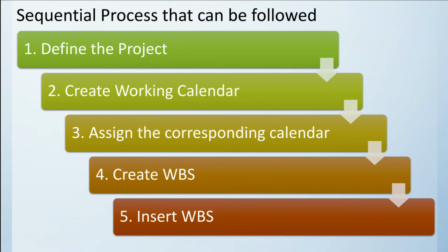Then, depending upon the organization and geographical region, the working calendar changes. Working calendar means the number of days and the number of hours a person needs to work in the organization. So it differs from company to company, firm to firm. So when you want to develop a project for a particular firm, you should assign the corresponding working calendar of that firm.